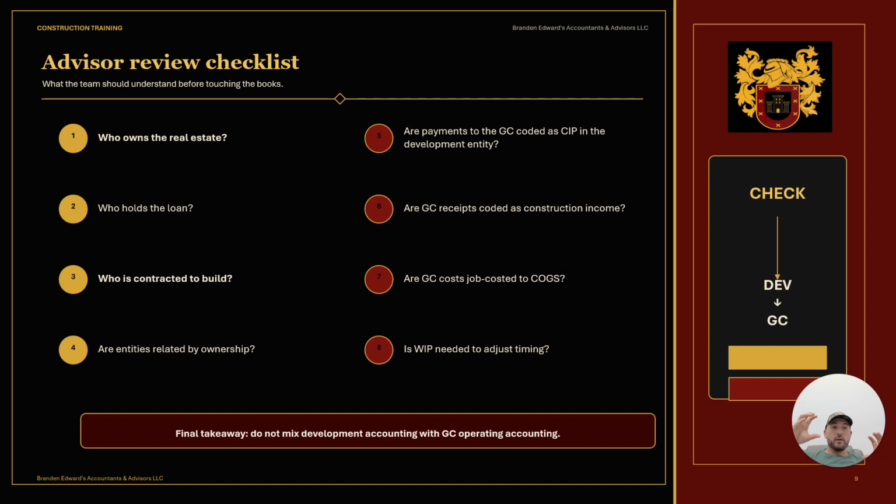Now, the very important thing to note is when we are closing the books at the end of the month, we will be providing general contractors with an estimate versus actual report showing the expenses of each of the items so that they can confirm if a budget adjustment is needed. So for example, let's say I have a $100,000 budget in tile. I'm $50,000 through my tile, but I know on the field I'm not 50%.